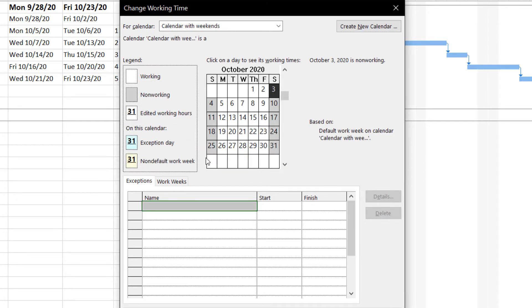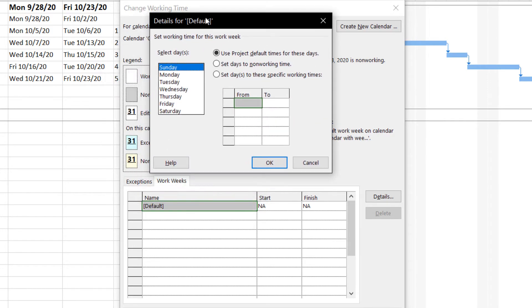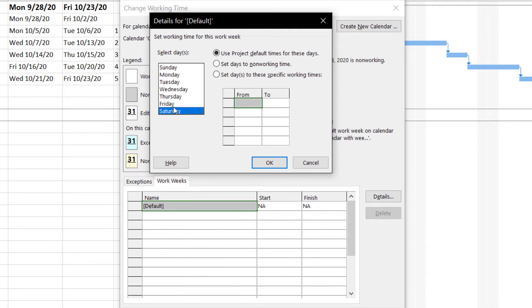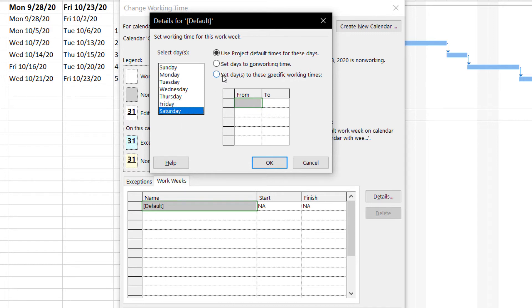Click on Work Weeks and double-click on the entry. You can see the selected days — by default Sunday has no working time, and Monday runs from 8 to 12 and 1 to 5. I will be setting the same working hours, 8 to 12 and 1 to 5, for Saturday. Select Saturday and click the option to set days to specific working time.